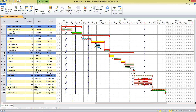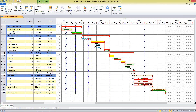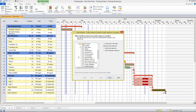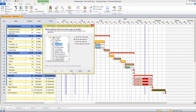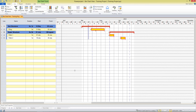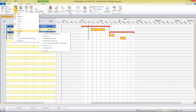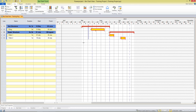Along with tables, up in the view section we have filters. Filters allow us to choose just a subset of data to display. For example, I've got tasks with different contractor codes, so I might choose to display only the tasks done by a certain subcontractor. I can come up to filter codes, select which code filter to use, and this displays my code libraries. From here I can choose which code I want to display — if I choose Acme Builders, I see only that information on screen. There are many predefined filters supplied with the software for certain logic, task types, or date ranges. To turn off the filter, click on the name of the filter at the bottom of the screen.